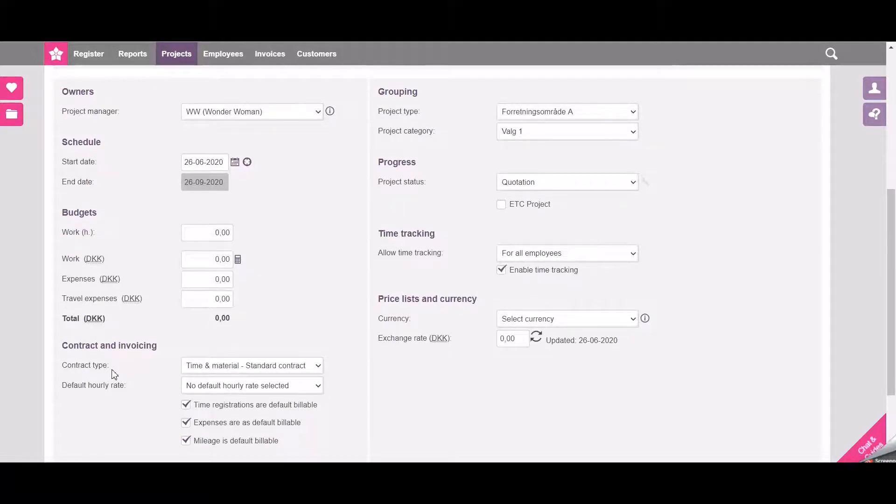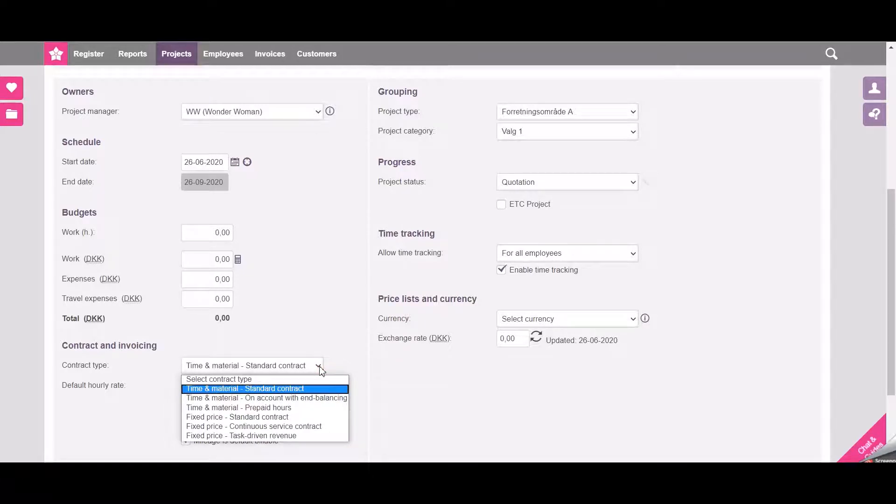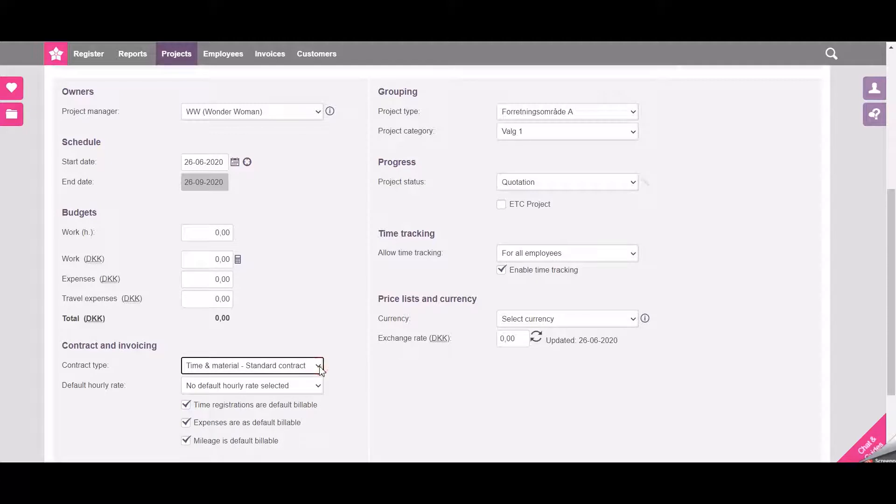The contract type can be chosen down here. You can select from all the contracts you have available in the system. In this case I will just choose the time and material standard contract.